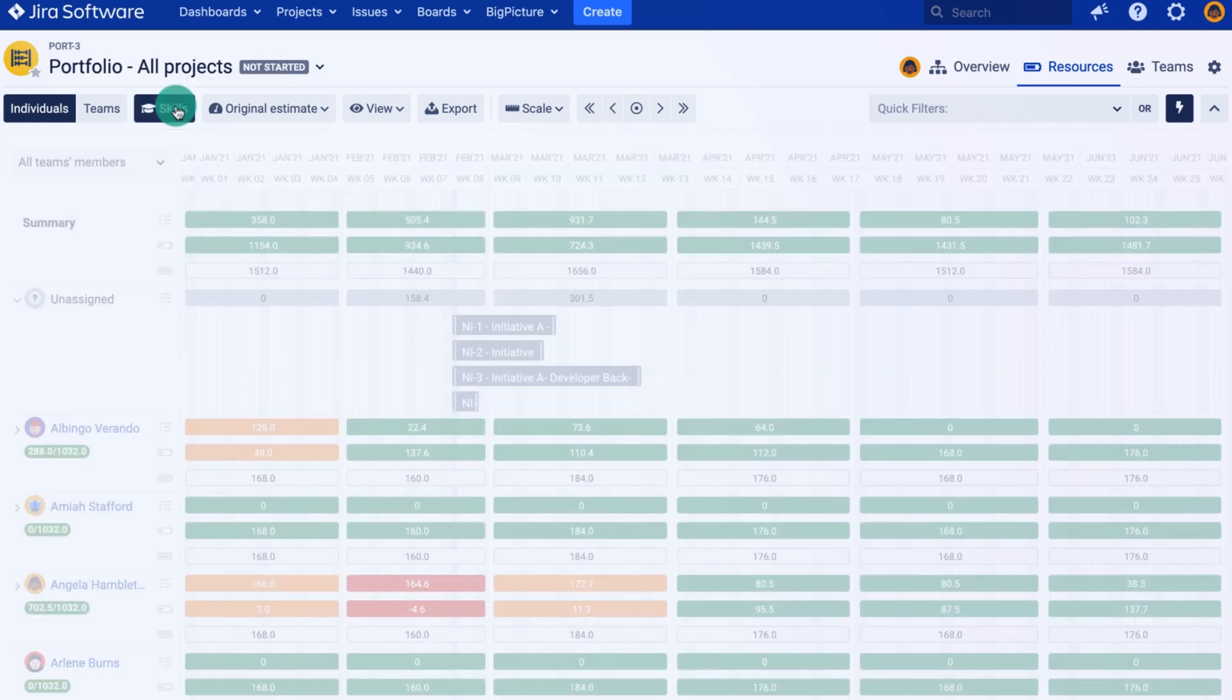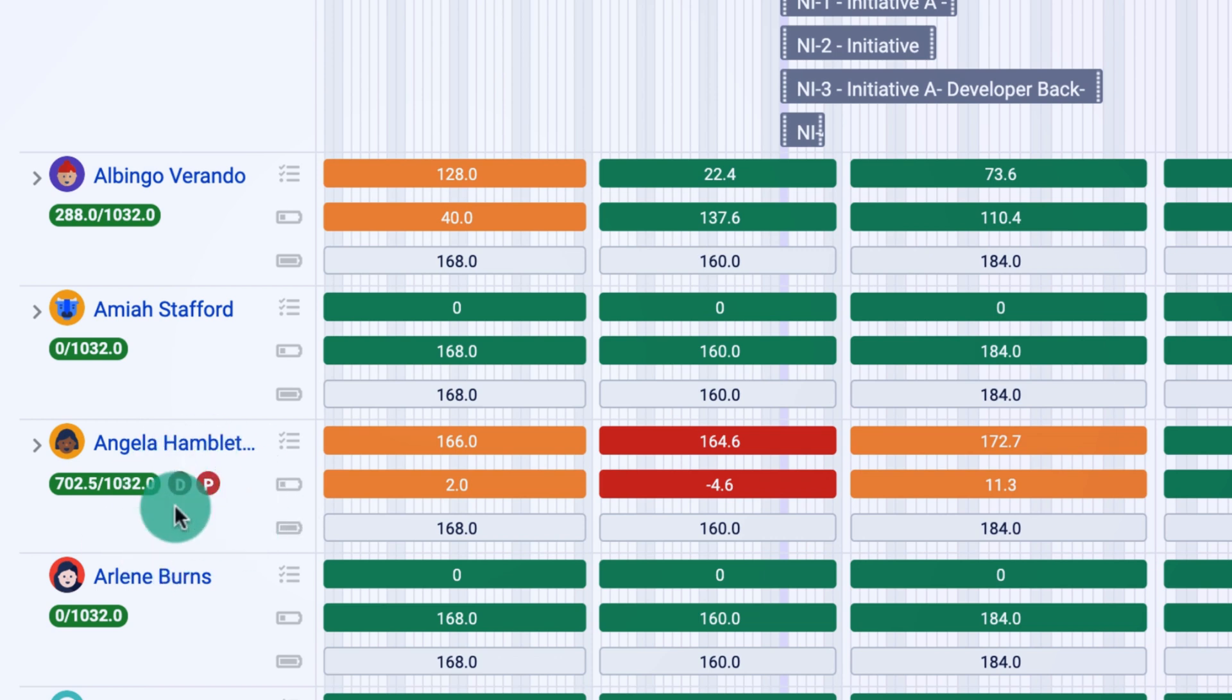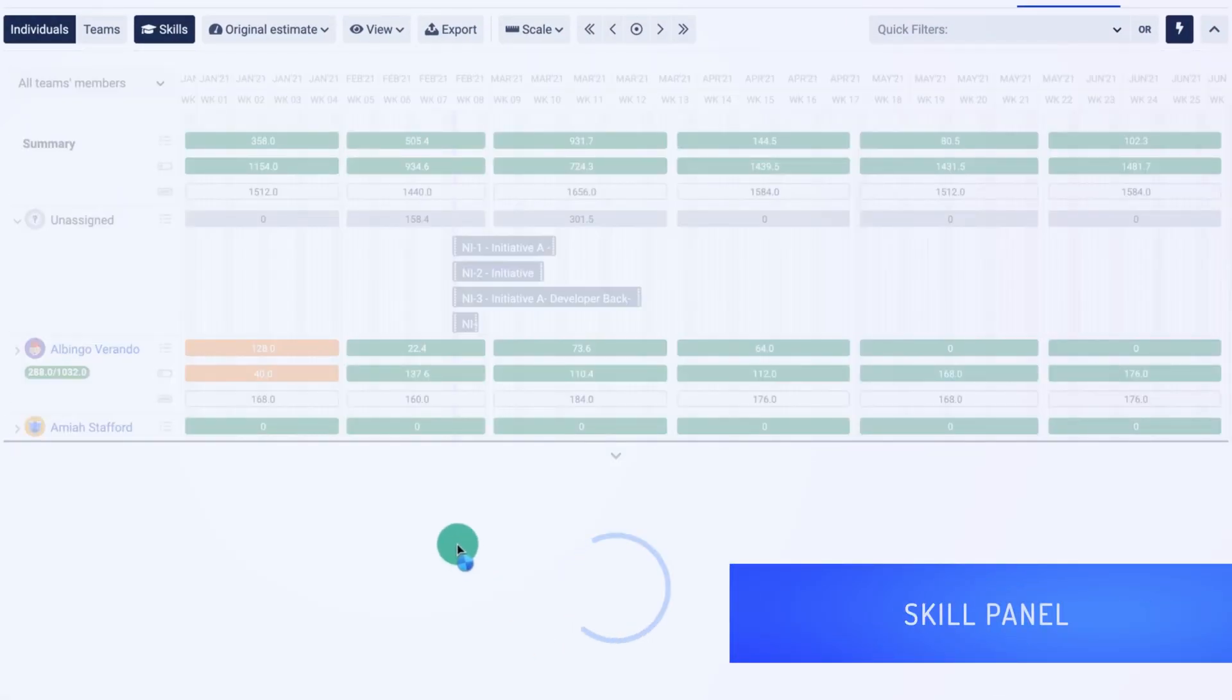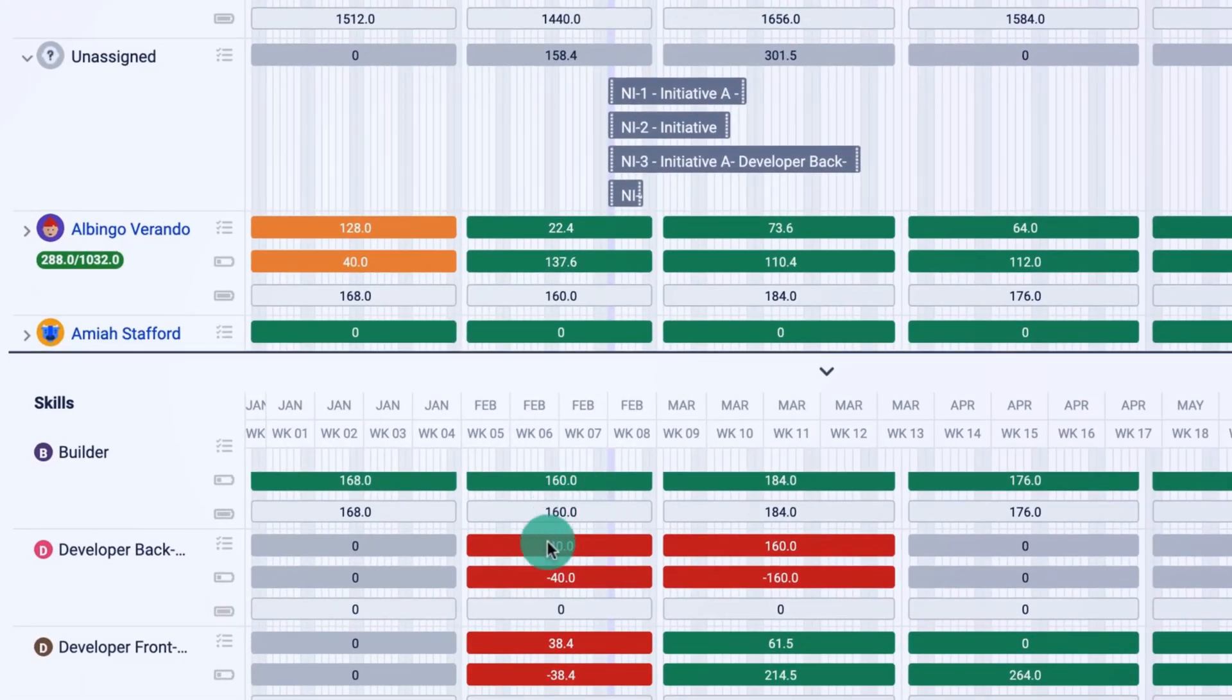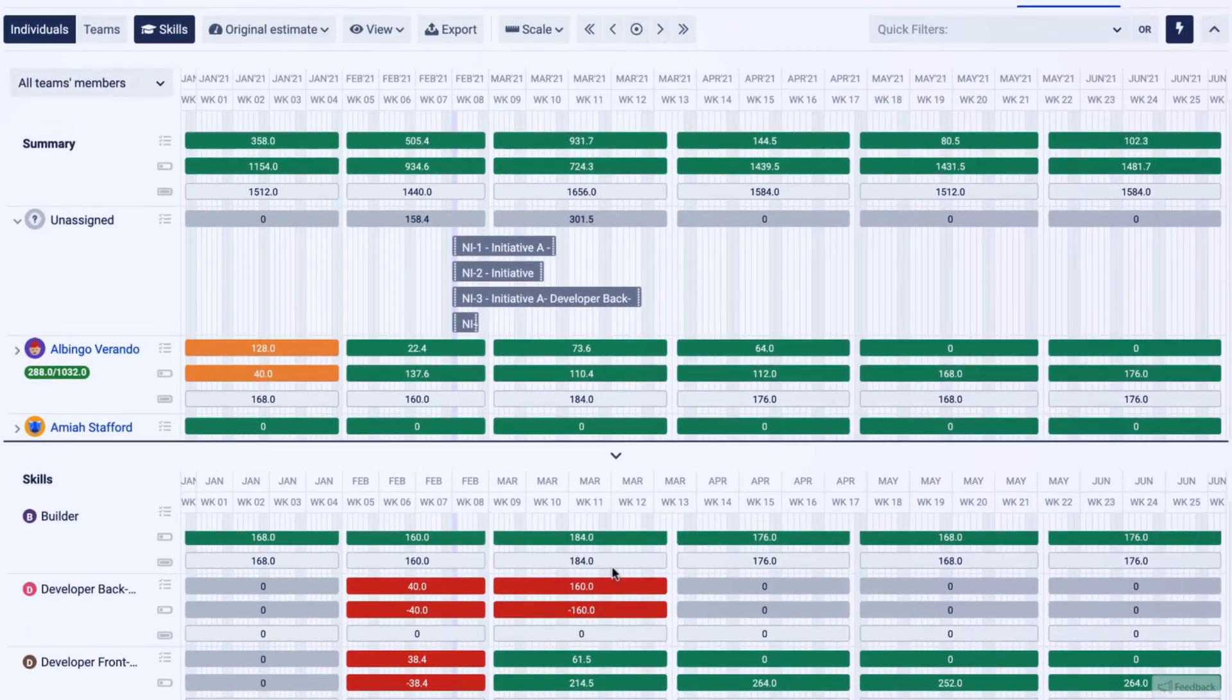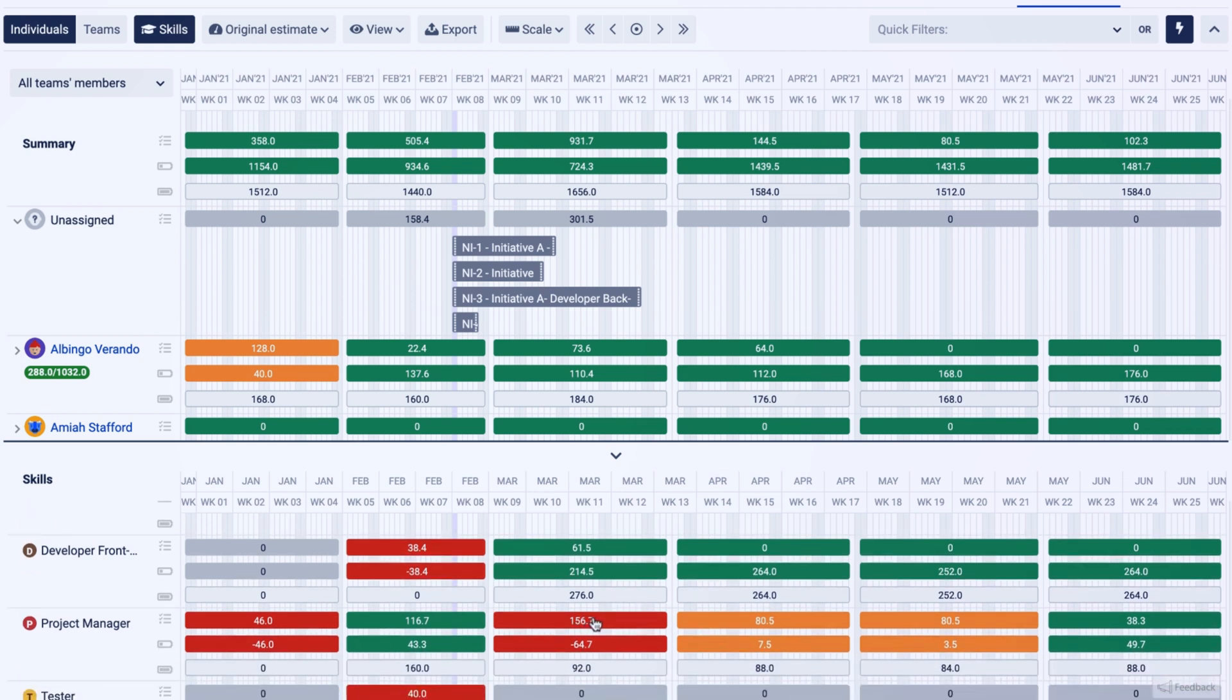But the next question is: do we have resources with the specified skill? Let's enable the skill button. As you can see on the left, resources that have a skill, for example D stands for developer, P stands for project manager. You can now open the skill panel. Now I can see the skill demand, and I can already see that I do not have a back-end developer within my team, while there is a demand since I've added a task that requires such skill. And I also have a problem with my front-end developer and my project manager.